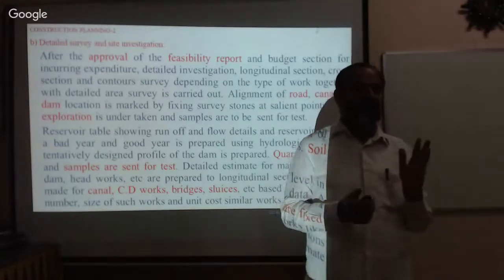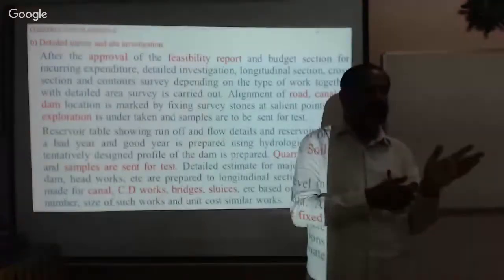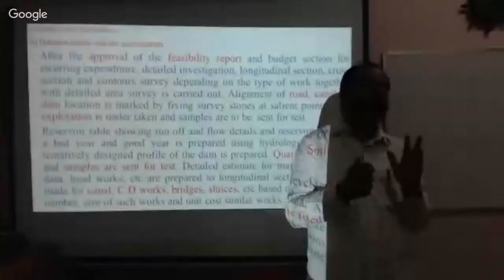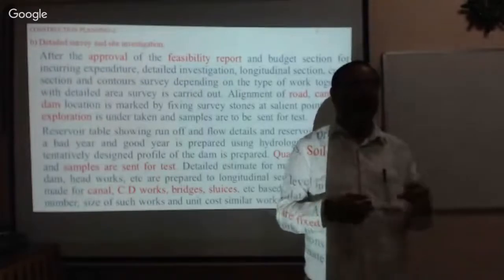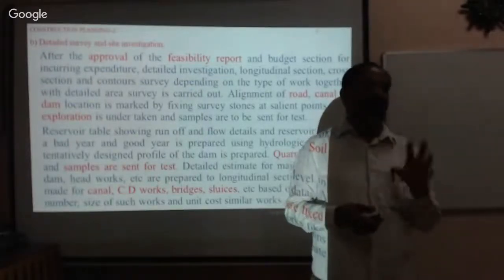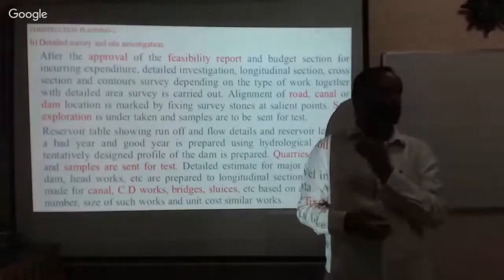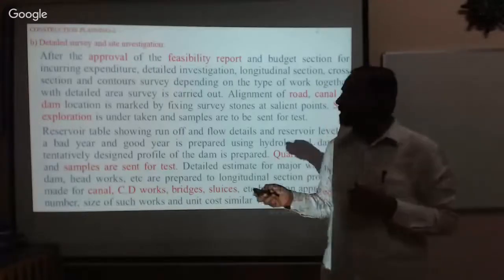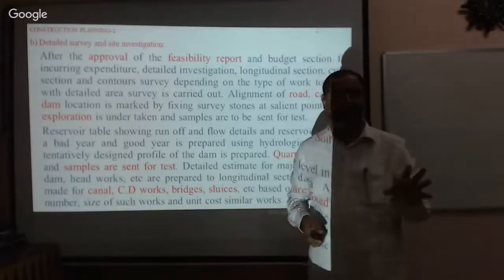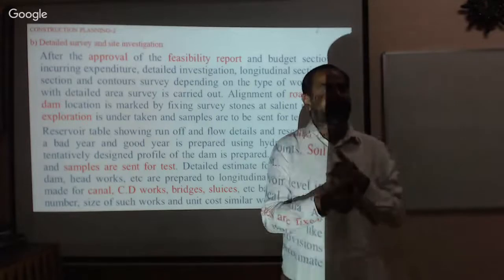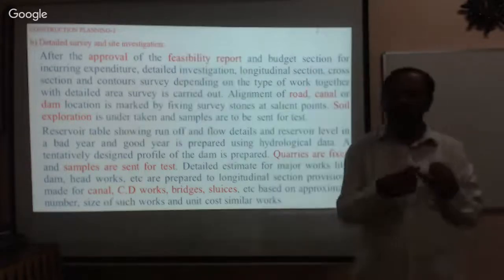Now, please remember that the first stage is always the preliminary report. It is a temporary report with approximate cost. Now we are working out the detailed cost of the project. Now this commences any project you take up, whether you are constructing the dam, whether you are constructing the road.